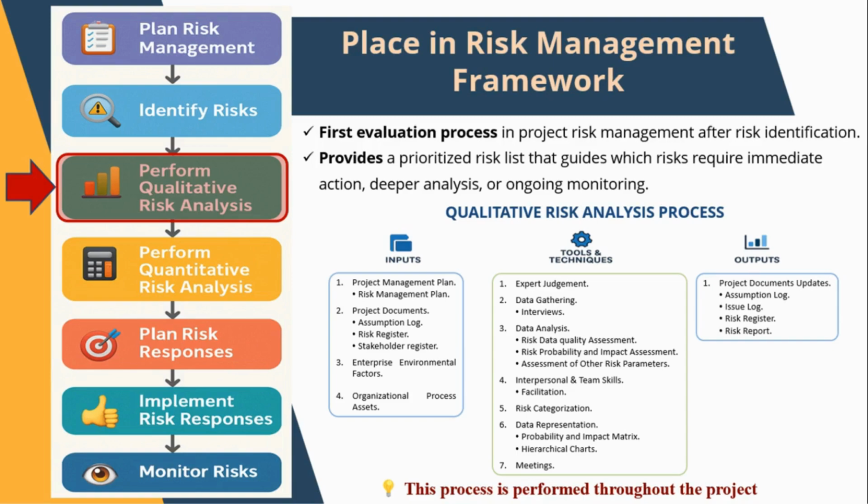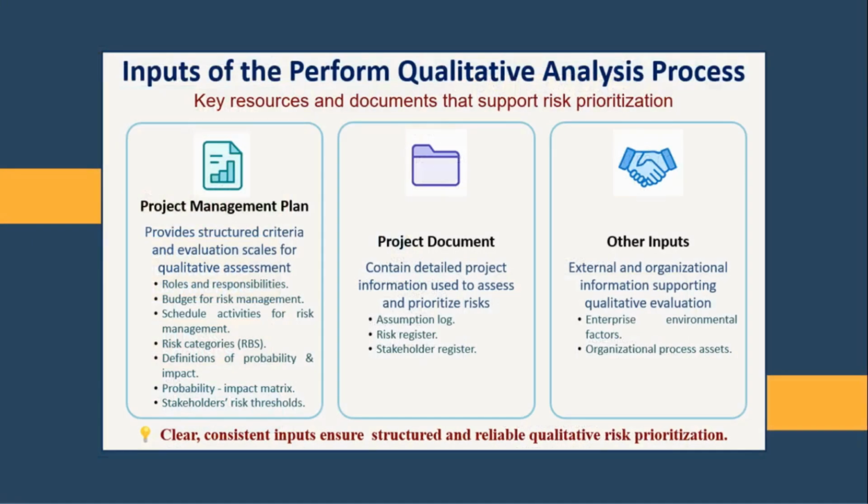over time. Effective qualitative risk analysis requires a reliable set of inputs to ensure that risks are assessed consistently and in alignment with the project's objectives. The first key input is the project management plan, which provides the overall framework for conducting risk analysis in a structured and systematic way. Within this plan, the risk management plan is the most critical component, as it defines how risks are identified, assessed, and prioritized.